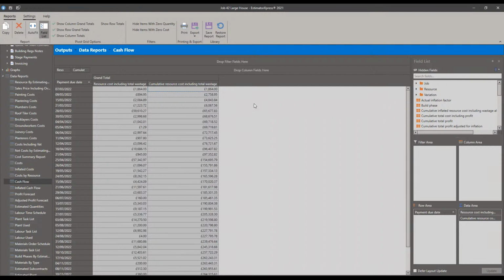And that'll also be in this report, combining the labor that needs to be done by that phase as well. So that's going to be the first few days of labor by the beginning of March as well. So I look at that and I can see, okay, this is the cash flow, the items coming out on each of those dates based on the material ordering.